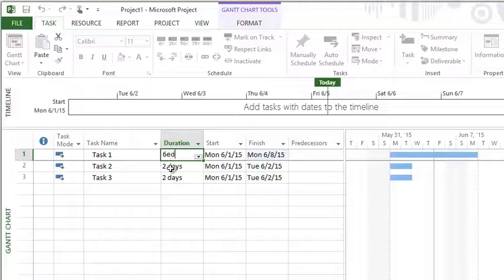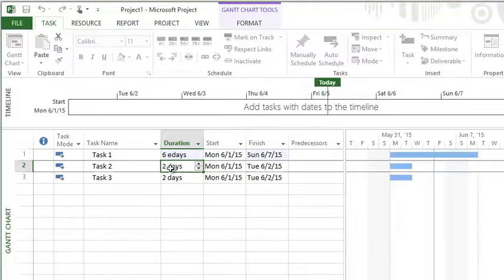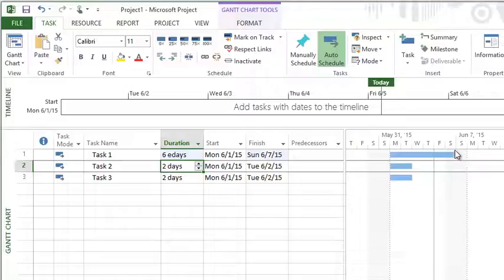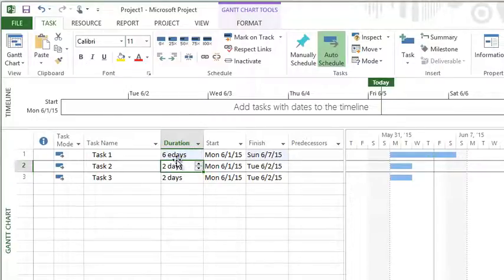So if I type 6 ED, watch the Gantt chart here. You'll notice that that task now finishes on the Saturday. So you're saying I would like elapsed time, and you can do that in front of any of the duration units.